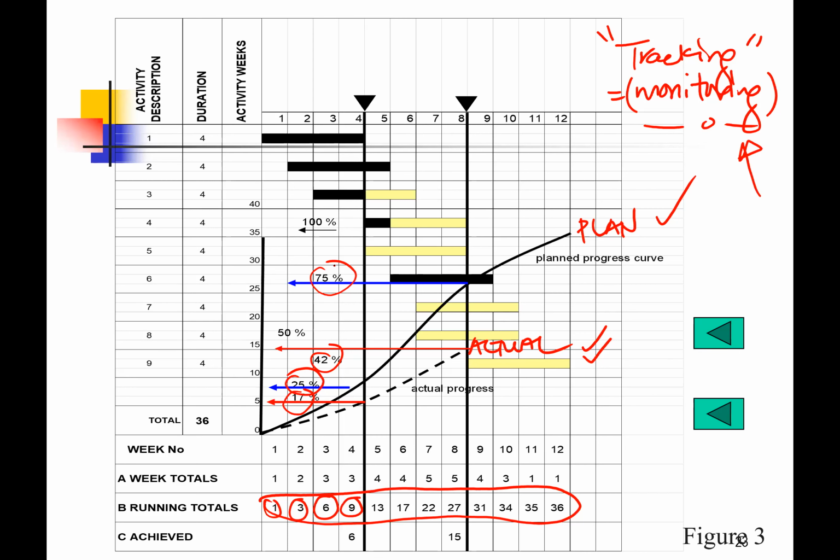So by right, you don't have to wait for that particular date to happen. At the beginning of the project, once you see your project is running late, you should act quickly so that this dotted line will basically catch up with this line.